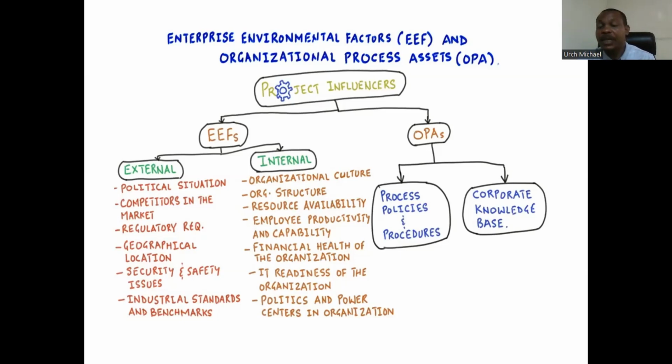Employee productivity and capability. Maybe you look at the staff you have, they are not technically sound, and they cannot handle this, it's going to affect your project. Financial health of the organization. If you have a plan and project and then the organization is not financially capable to handle that project, it's also going to affect your project.